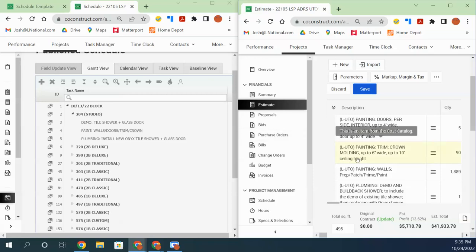You want to simplify what's in your estimate and get the story told of what we're doing on that unit or project, with as few line items as you possibly can. So anytime you're able to combine some, review it a couple of times. Whenever you get done, review it one more time and see, okay, is there any more simplification I can do? Can I add anything else together at all?